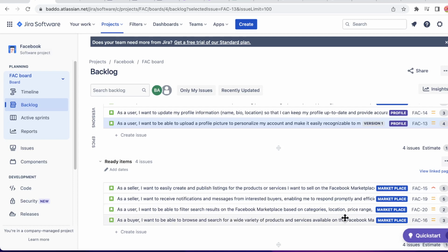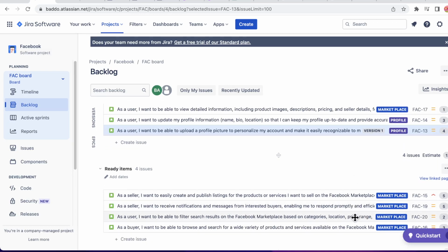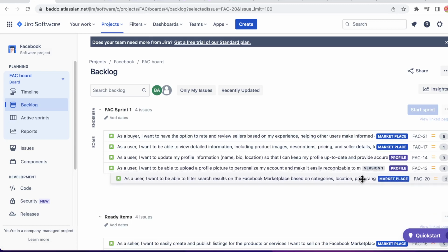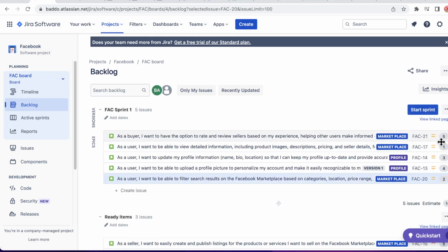So we can have a discussion with the product owner. Okay, if it is not going to be a challenge for us to bypass this user story and then pick this one. If the product owner agrees, we can pick this one, for instance, 13 plus 2, and then we get a 15. Okay, at this point, we say we are done with the sprint planning.